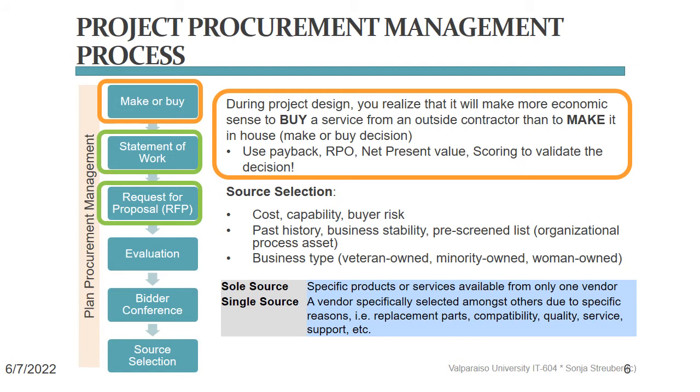You will have to publish these on your company's website or in industry forums in order to get potential suppliers to submit their offers in time. And yes, that deadline, together with your evaluation of these offers, need to become another line item on your project schedule.